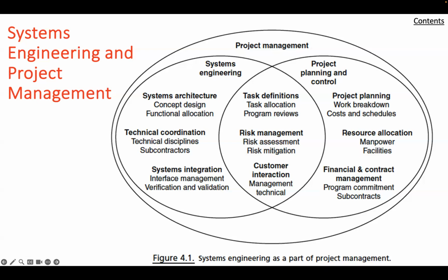Specifically, the system engineer focuses on being responsive to the customer needs, ensures a statement of work is based on a credible concept of operation, reviews the implied design for the use of legacy components and their availability, examines to see if the proposed system integrates commercial off-the-shelf, or COTS, and determines the technology readiness levels for the important subsystems envisioned in the preliminary system design.